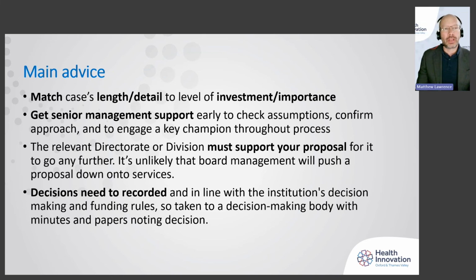Main advice then generally is to match the case's length and detail to the level of investment or importance you're attributing to it. So essentially, if you've got a £10,000 project or business case, you don't need to write 20, 50, 100 pages. That's not necessary. As long as you can make it succinctly and say what it is, that's probably an easier decision to be made. It may not formally need to be in writing. It probably should be. It doesn't hurt to do so, even just in a short version.